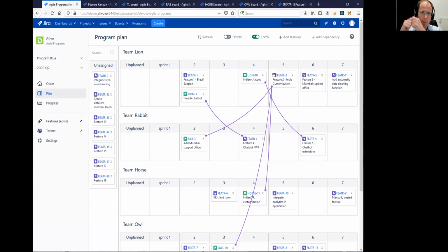What SAFe means when you plan a feature in a specific sprint: obviously a feature is something quite big, it takes multiple sprints to complete. So it's very rarely that you start and end it in the same sprint. Then it would normally be a story. So when we plan it in a sprint, it means that all the stories under it are in the sprints before or in the same sprint, but that could be risky. And the feature, it means it will be delivered in that sprint.